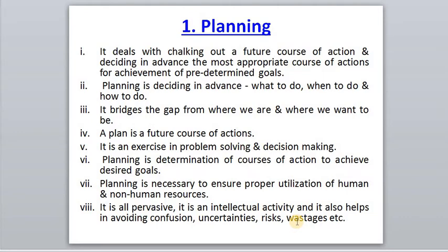Okay. How much material will be required to execute, suppose we have to cast a slab? How much steel will be required, how much cement, sand and aggregates will be required in casting 100 cubic meters of slab, or 50 cubic meters, or 10 cubic meters? Then we are reducing the wastage because we are calculating the materials required, the labor required, and the various equipment required prior to the construction.